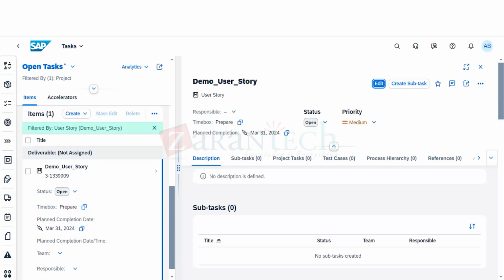In Cloud ALM you can check it at so many levels, that it could be that your project is just checking at requirement level, right? And this is from a live project: the work has not been completed, but just to show that the percentage completion is right, they have gone and changed the status of the requirement to completed. But the user story is not completed, because whoever is checking, the project manager or the leadership, they are only tracking at a requirement level, right?